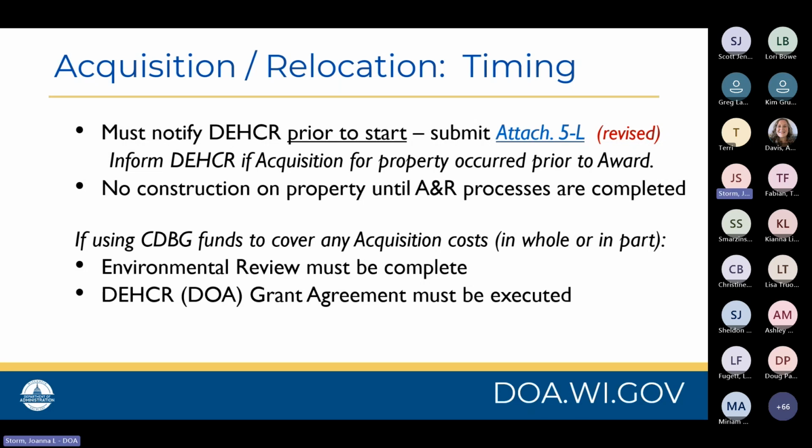Note that no construction on property can begin until the acquisition, relocation, or combined AR processes are completed. If you intend on using CDBG funds to cover any acquisition costs, whether in whole or in part for those acquisition activities, you must have an environmental review that is complete and certified by our environmental review desk. And DECR, or DOA, our grant agreement with your municipality must be fully executed.